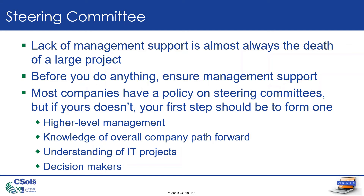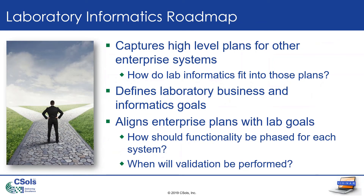This committee usually consists of three, four, or five people — very small but higher-level management, maybe an IT coordinator or director, or VP of IT. They need to have knowledge of the overall company path forward, knowledge of ongoing IT projects, and how IT projects work generally. They need to be the people who can make decisions — both at the project-team level when consensus can't be reached, and at the higher level, such as defining that the sole purpose of the LIMS is to improve data integrity — and they need the authority to push those decisions down the chain.